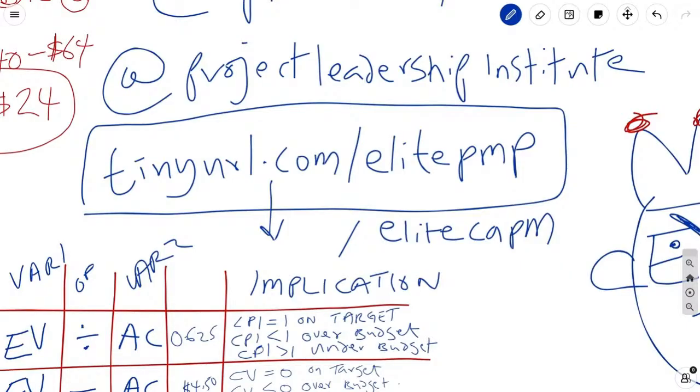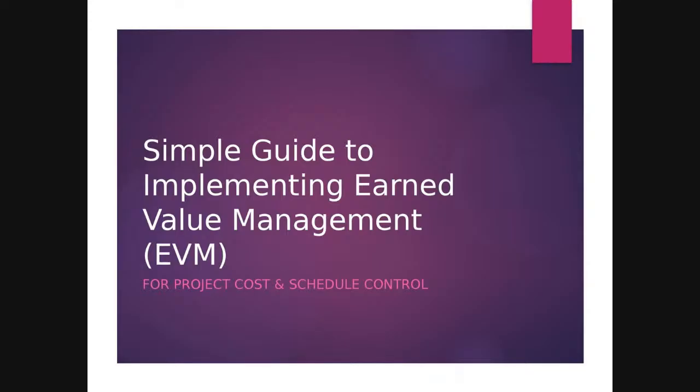You have to understand the budget tied to each deliverable. And when I say deliverable, I'm really talking more about the word you folks know, work packages, right? You got to tie it into the work packages. And then you even need to go deeper. That's right. You actually need to get into tasks in some instances, depending on your bandwidth and your level of control.